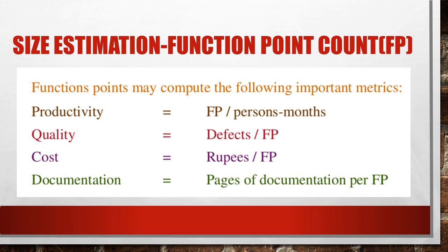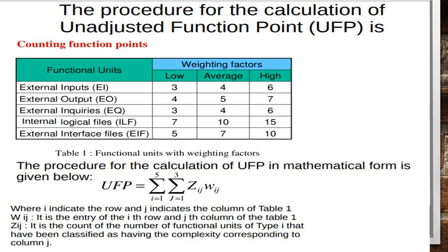An ISO standard for function point method is also being developed. A function point can be computed by multiplying unadjusted function points with the complexity adjustment factor.